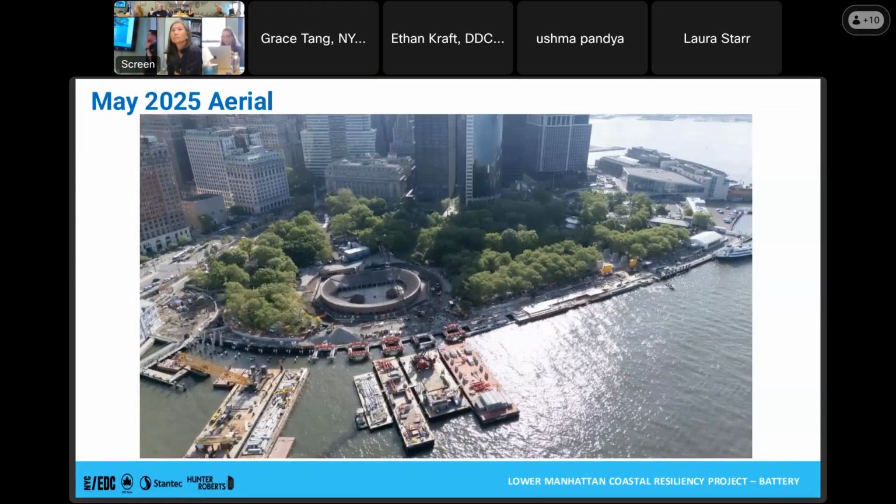Likely this is going to be a setup running out. All of the work that is going on upland, those are all the retaining walls that are going in. As soon as the topping slab's poured, we can get the finalized fill, our final elevations, start placing the granite, and really push ahead with this project. This is the photo that Patrick had up, highlighting where the topping slab is, planks, beams, and it's just repeating the process all the way down. We're finally into what we like to call the Esplanade area, right by Gas Clinton. It's a much more workable area than the very narrow area we're right over here. This is a very, very tight area. It's fun.